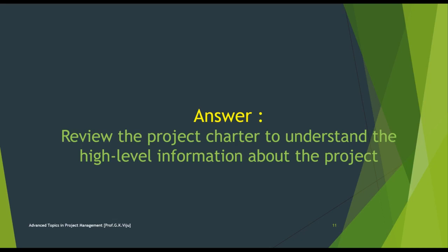Second one, review the project charter, which I already explained. Third one, begin the process of identifying stakeholders so they can be engaged as necessary for project planning, which is also incorrect because the identify stakeholders process is part of the initiating process group. The question states that project planning is about to begin, which suggests that the processes associated with the initiating process group have already been completed. Therefore, the identification of stakeholders is not the first activity to be completed for project planning. And fourth one,